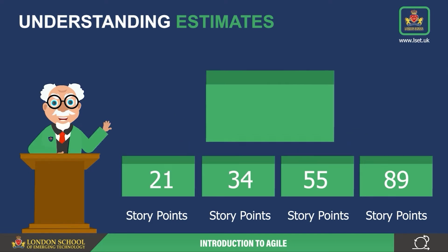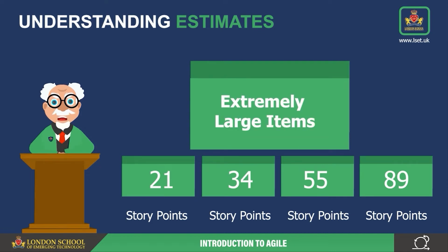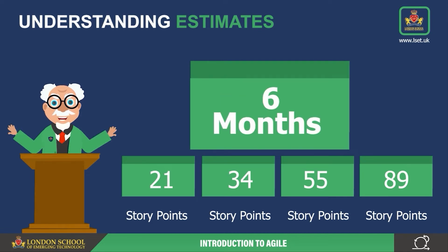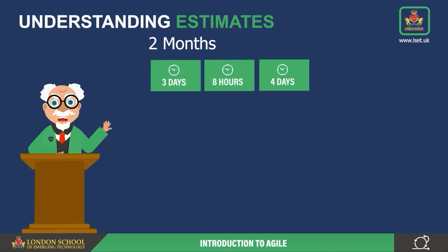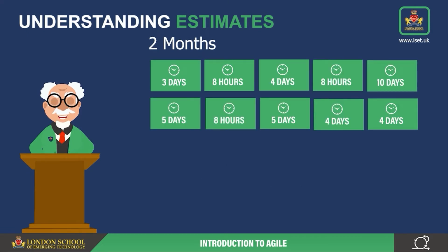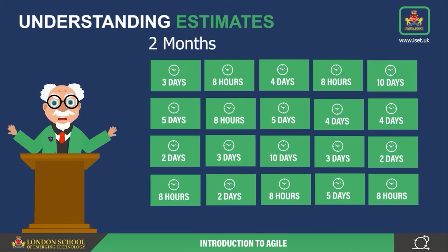It is similarly estimated in months for extremely large items: 1, 2, 3, or 6 months. In reality, such items will need to be substantially broken down before the work begins. We'll get back to these estimates shortly.